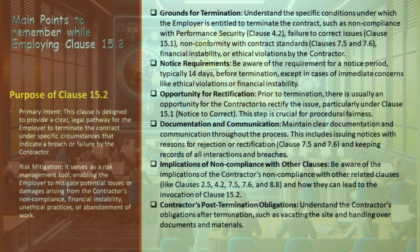Grounds for Termination: It is crucial to understand the specific conditions that warrant termination, including non-compliance with performance security (Clause 4.2), failure to rectify issues as per Clause 15.1, non-conformity with contract standards (Clauses 7.5 and 7.6), financial instability, or ethical violations by the contractor. Notice Requirements: Be cognizant of the need for a notice period, typically 14 days, prior to contract termination. This requirement is waived in cases of immediate concerns like ethical violations or financial instability. Opportunity for Rectification: There is usually a provision for the contractor to correct the issue, especially under Clause 15.1, which is integral for ensuring procedural fairness.